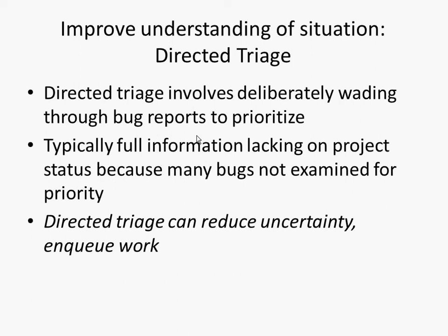Okay. So the issue here is that you may have a lot of STIs in your database, your issue tracking system like Jira or Trac, that you don't know yet how serious they are because no one's sanitized them yet. No one's attached priorities to them yet. No one's even figured out if they're duplicates. And if we want to know how close we are to actually pulling together this version that we're trying to get to the client next week, or if you want to know what's the chance you're going to actually get the features done in time for the next milestone in this class, it makes sense to pause sometime and just wade through that and figure out where are we at.